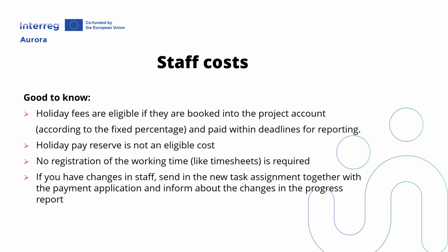Finally, some things to keep in mind when it comes to staff costs. Holiday fees that are booked into the project account according to the fixed percentage and are paid are eligible. The holiday fee should be stated in the payslip for that month. Hence, holiday pay reserve is not an eligible cost. No registration of the working time, for example timesheets, is required. It is the task assignment with the fixed percentage that is crucial for the staff costs in the project.